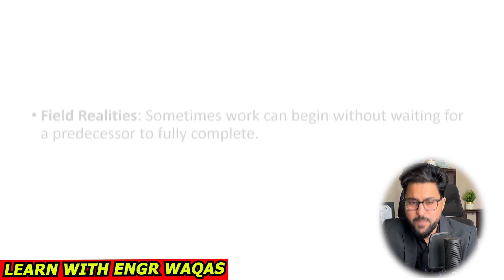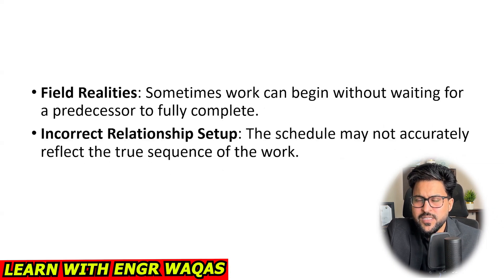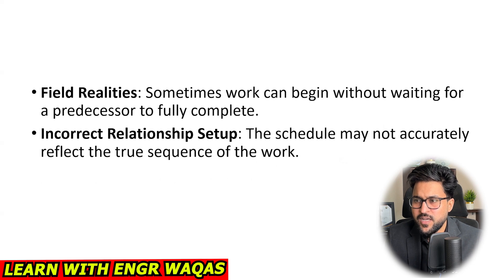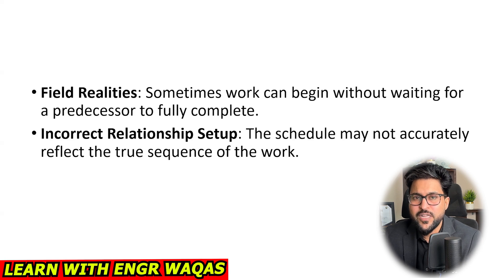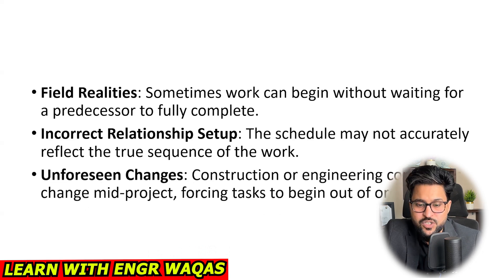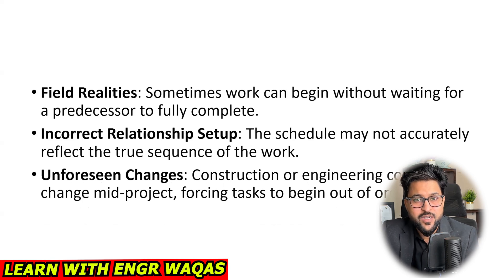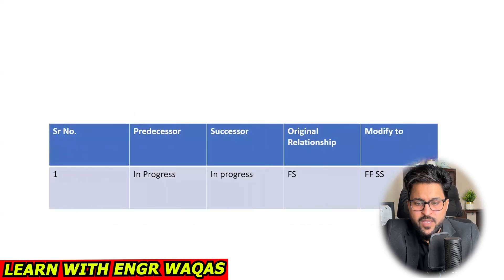Let's understand the typical reasons — they may ask you such things in job interviews. Typical reasons include: field reality, incorrect relationship setups (planning engineers sometimes develop hypothetical relationships, so you should be very logical and realistic while developing activity relationships), and unforeseen changes — construction or engineering constraints can also lead to out-of-sequence activities.